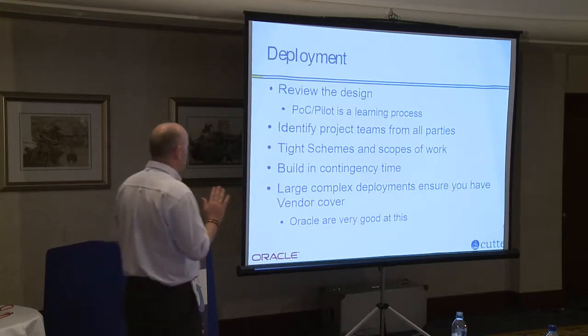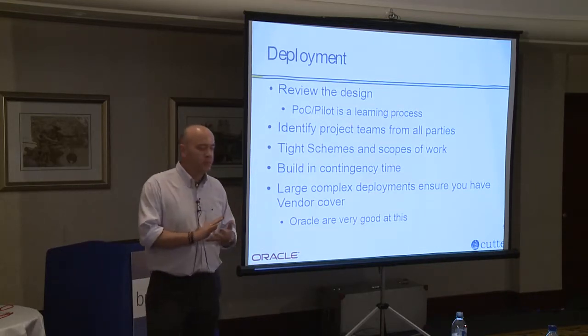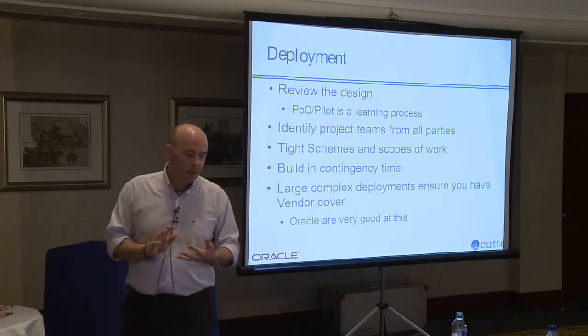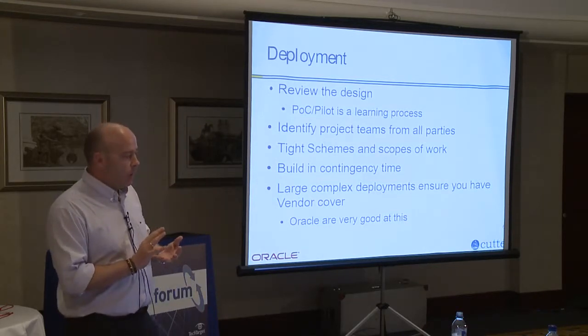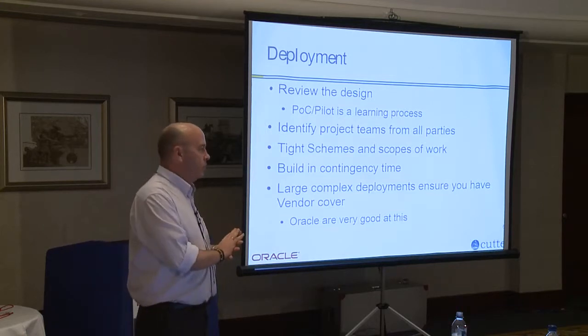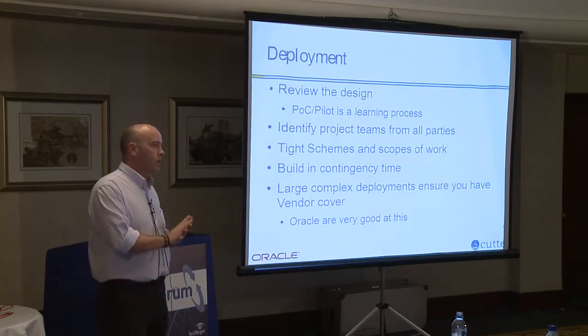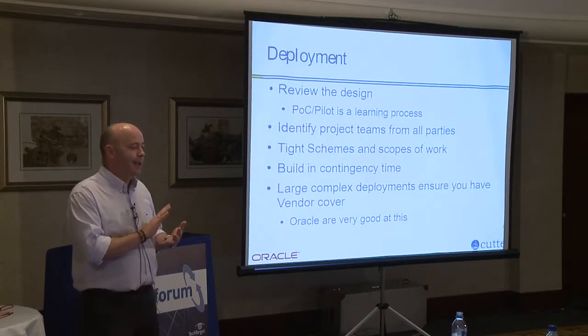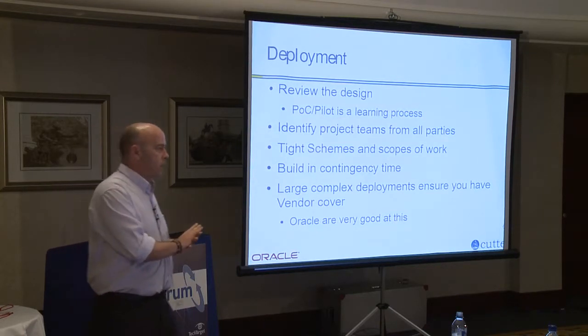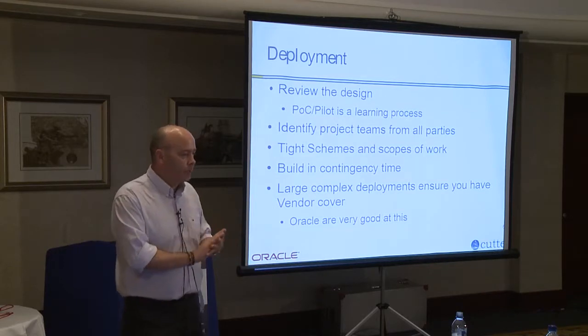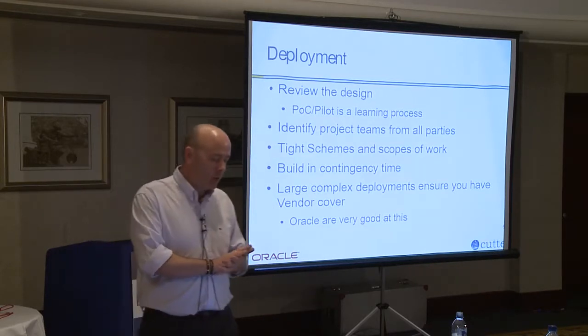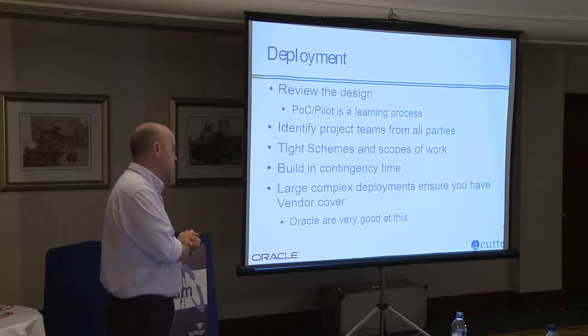Building contingency time. This always takes longer than expected. Every single project we've been involved with has taken more time than the customer originally expected. And it's normally because of knock-on effects from things like ISVs, application management, application assessment, and things like that that have extended the time. So build in some contingency time.